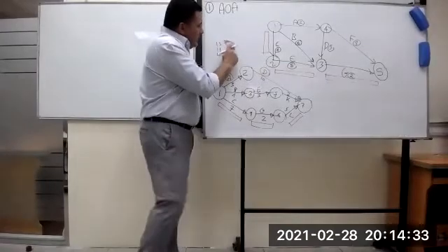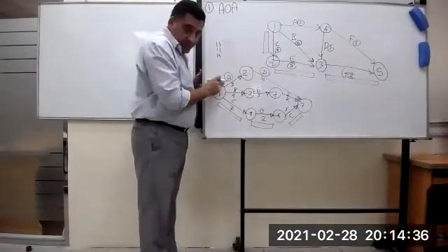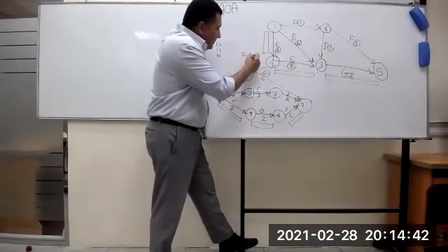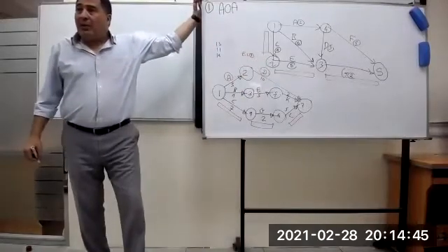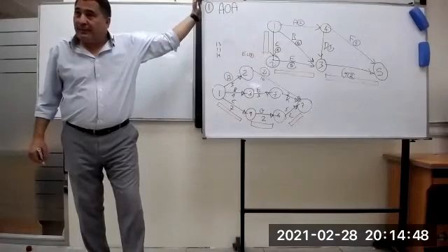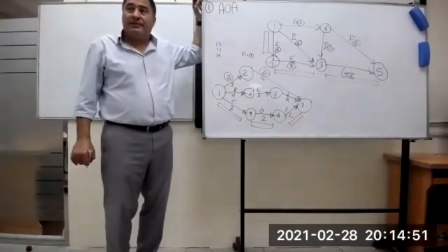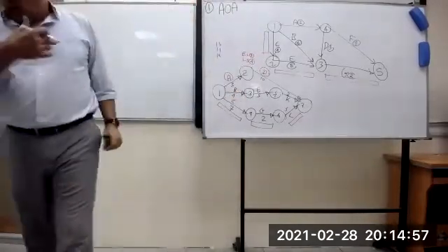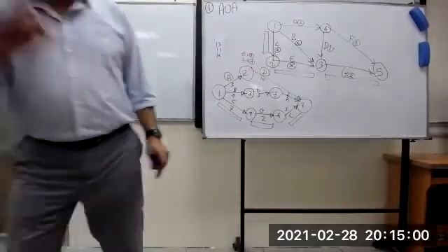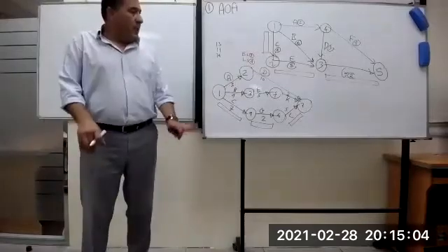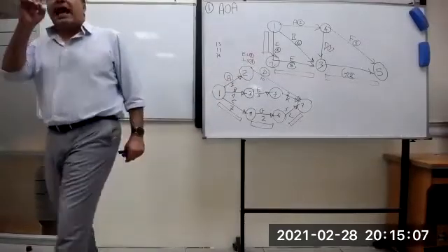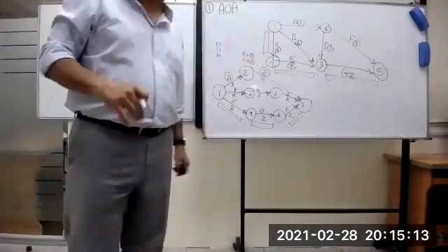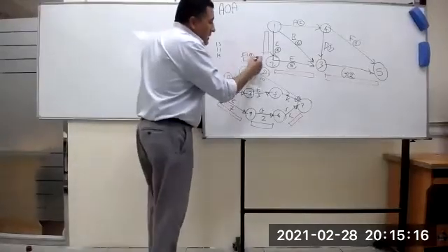This activity starts when? After 3 days. So early start is 3 days. Now what about late start? Late start is 4. In your exam there is a network like this, and they give you an activity, and they ask what is the early start and late start for this activity, and they give you 4 options. Early start 3, late start 4.